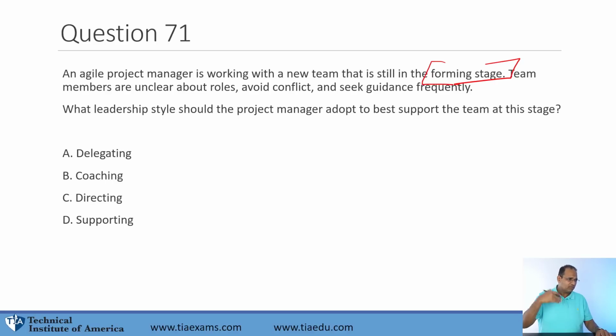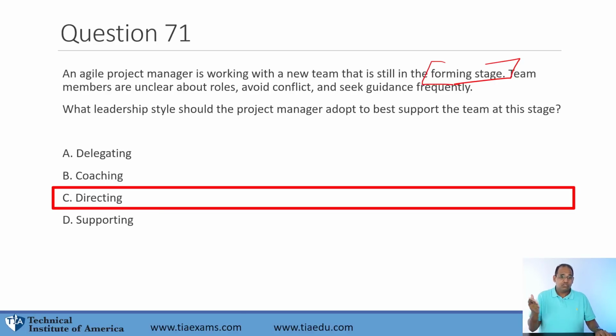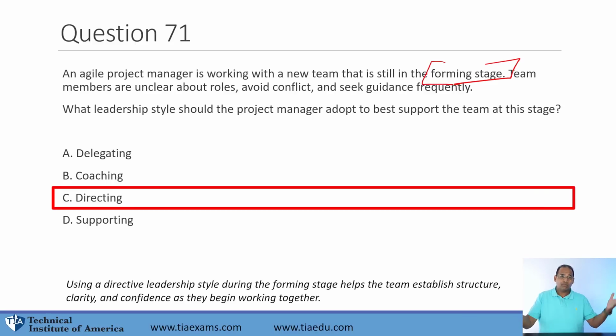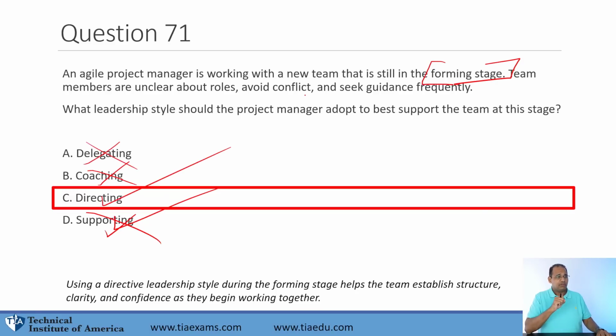Should you be supporting them, coaching them? Well, they just formed and they're going to be needing direction. So you're going to be directing them because they don't know what this project is all about. They just formed, they just came together. It's not until the team really understands the work and they start doing the work that you start supporting them. Maybe they have some issues. You're going to support them in resolving those issues and coaching them through the problems. Let's put X's there. Delegating is for when they determine what work to get done. So in this scenario, you have to direct them in the early stages of the project.